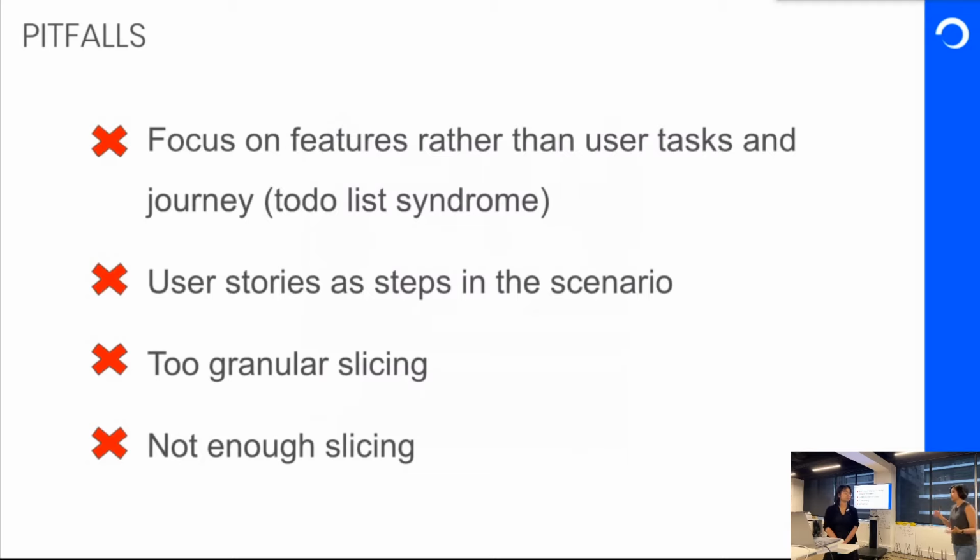There are times when we go into a lot of to-do lists where, oh, Darren will do sort, and then he'll select relevance, then he'll select. So those become very to-do list, whereas your story might be sorting functionality, right? Or your story might be having a hero image which talks about the discount the online shop has, right? That can be a separate story of itself.